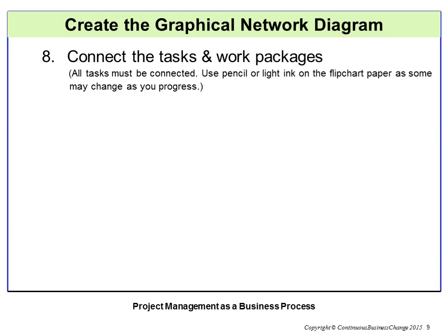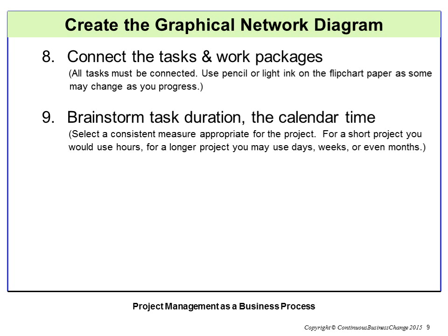Connect all the tasks and work packages by drawing lines on the flip chart paper using a pencil or light ink pen. Changes may occur as you progress. Brainstorm task duration, the calendar time. Select a consistent measure appropriate for the project. For a short project, you would use hours. For a longer project, you may use days, weeks, or even months.